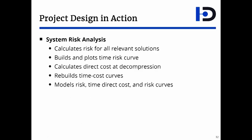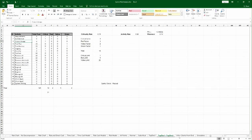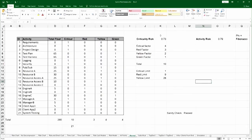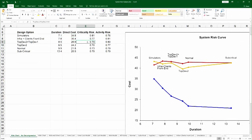There is also a matching file for system risk analysis. It calculates the risk for the various solutions. It rebuilds the time-cost curve because the direct cost is not known at the compression point — you have to calculate it. It calculates the various risk curves and then models them. The right-side portion of that file contains tabs for the various solutions, each showing how to calculate the risk for that particular solution. The left tabs capture the data, so you only calculate it in one place. Everything is copied over automatically — what you see is the original risk curve and the direct cost curve.